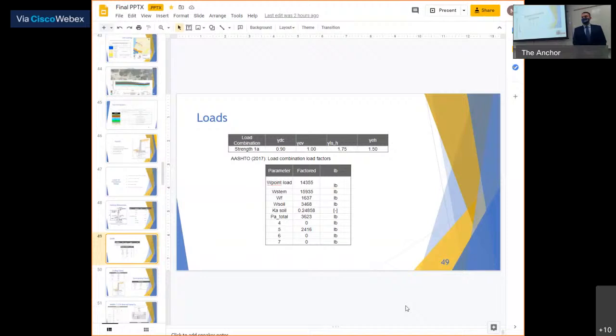Did you include your roadway acquisition cost? That is a good point. We did not, because we don't have a finalized number, and the person's property that we are going to be moving into and needing that easement from, it's quite a chunk of the parcel, so we really didn't know how to quantify what that person would be asking for as far as compensation. Centurion right now is still, to our understanding, in the process of trying to get those finalized. So we couldn't use the numbers that they haven't finalized yet.